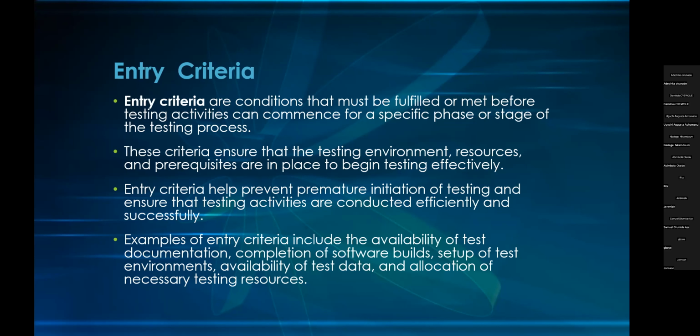For entry criteria, it helps prevent premature initiation of testing and ensures that testing activities are conducted efficiently and successfully. Examples of entry criteria include availability of test documentation, completion of software builds, setup of test environments, availability of test data, and allocation of necessary testing resources for your entry criteria.